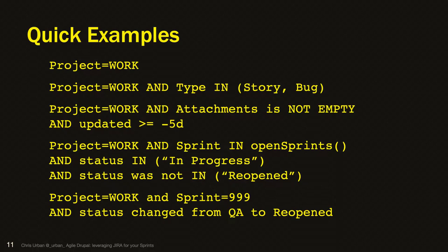We'll talk about how you can put this all into a Google Sheet, and as you get through your sprints, especially as you have a long-term project, sprint 1, our reopen rate was 80%. Sprint 2, our reopen rate was 60%. Sprint 3, our reopen rate was 20%. So you can show progress to your customer to say, hey, this is what we expect from a project. The first sprint, everybody gets their sea legs, right? By sprint 3, they should have a really low reopen rate. You want to be able to demonstrate that. Now you have queries that you can do that with.